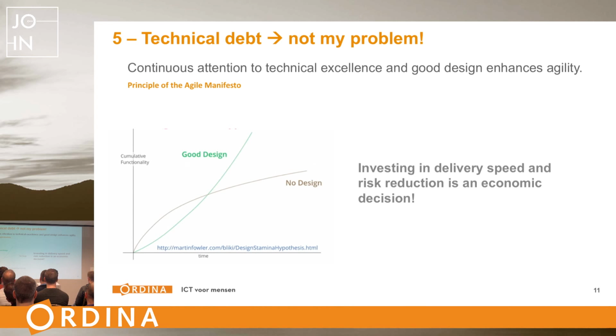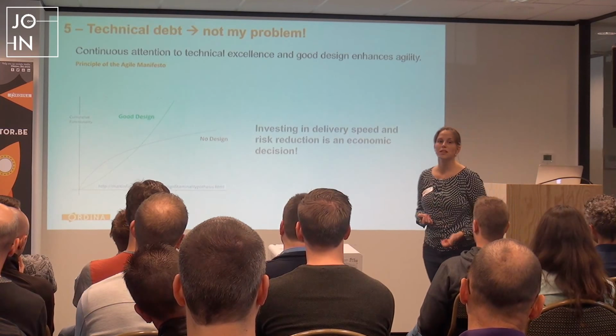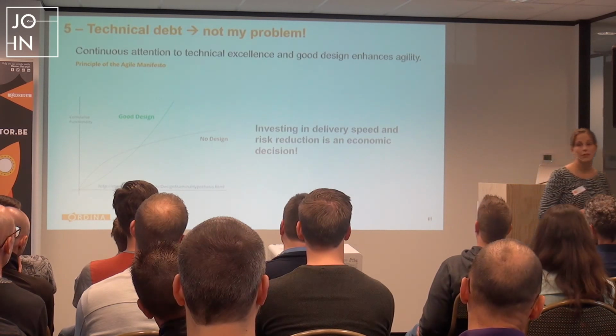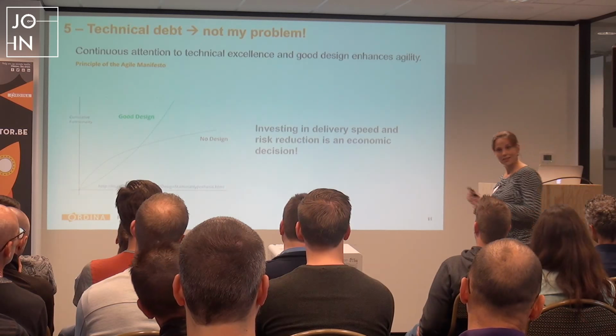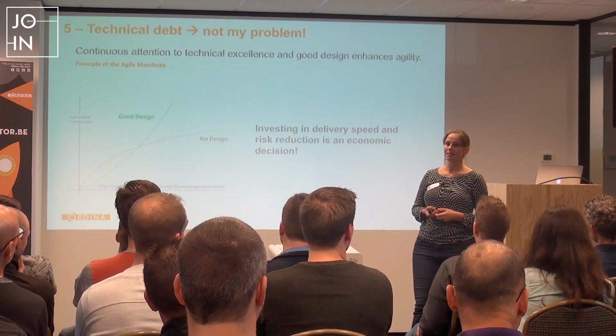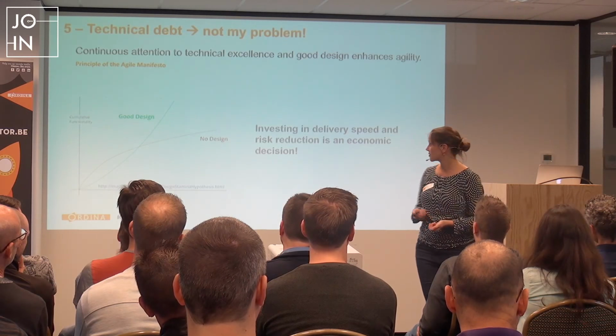Investing in delivery speed is something where it is often said, "Hey, that doesn't have any customer value." True. Customer value is not always business value. We talk in Scrum about business value. Business value means you can also sometimes invest in things. If you're investing 2 months now in speeding up your delivery process and can deliver the next 3 features in 1 month instead of 2, you actually gain something. There needs to be a relation, but it's still an economic decision.